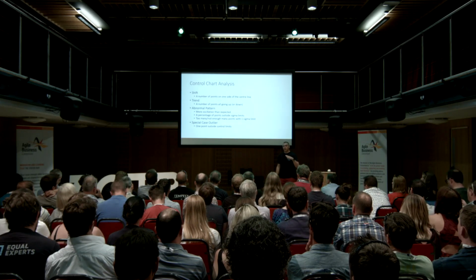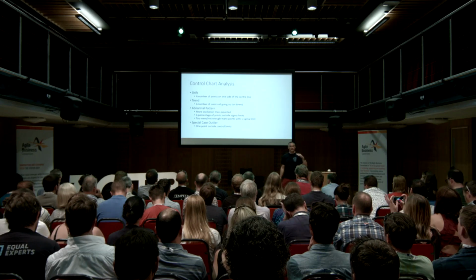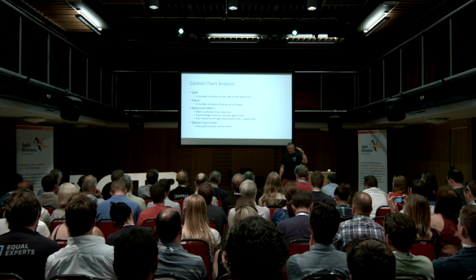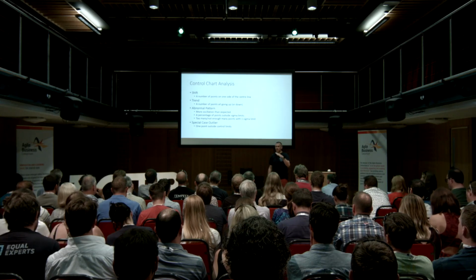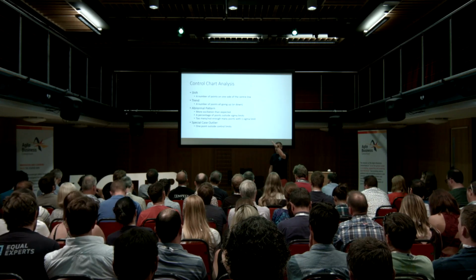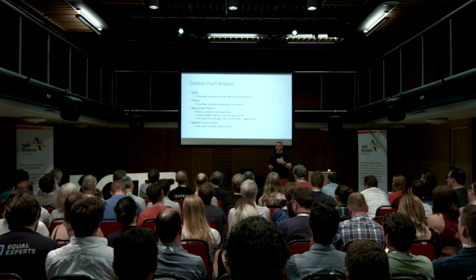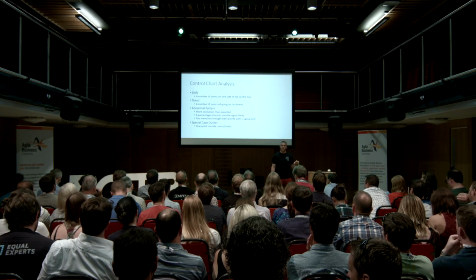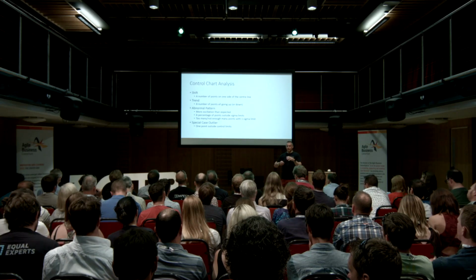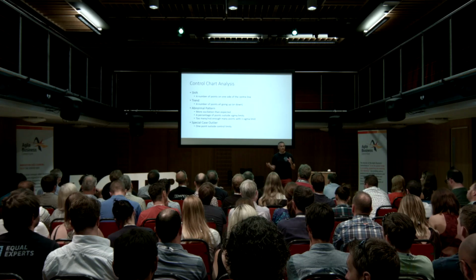You can look for a trend. So your data is going along quite randomly in the middle, and then it starts to have a trend of multiple points going up or multiple points going down. It can start indicating there's a potential problem. You can look for abnormal patterns. Our abnormal patterns category is kind of a catch-all.